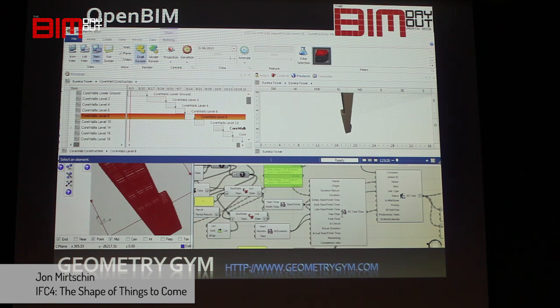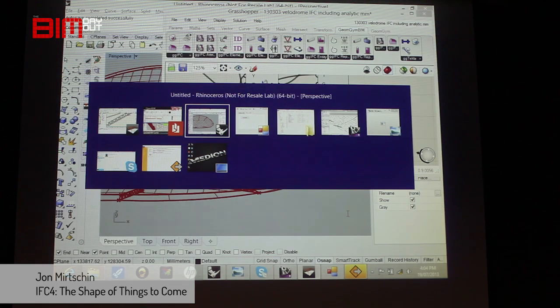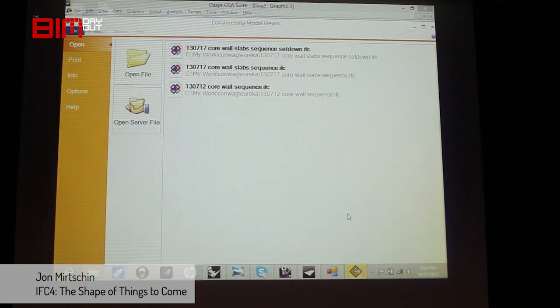And you can put in restraints. So, for example, from a structural engineering perspective, we said the core can only freestand 25 stories above the other superstructure. So you can build that sort of constraint in so that you can actually get accurate predictions of the construction schedule or time scale.